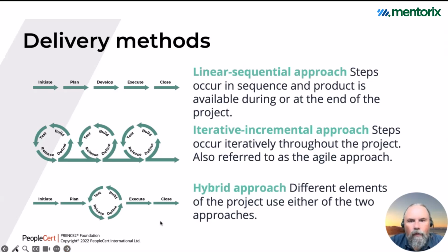Delivery methods, I've already been through this. In PRINCE2, in the new version here, we operate with 3 different delivery methods. It's not that the project as a totality needs to settle on one of these 3 delivery methods. It's actually stated that these are different approaches you can use, and perhaps 2 teams are working on a linear approach, so the more stage-gated approach. 5 other teams are working on the more agile, the iterative incremental approach, and 1 team could use the hybrid.